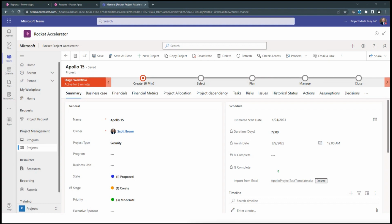Okay, so a question came in: do all team members get to change the product? Yes. In Project for the Web, when you invite a team member, a resource, you saw where I was adding Jen and Drew and Debbie and Gaurav to individual tasks. They actually see the whole project, so they can edit everything because it's using Microsoft Groups.